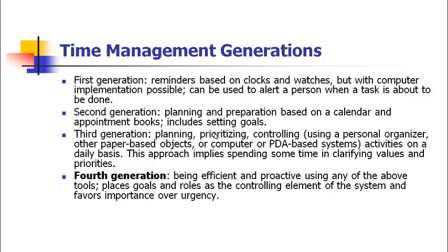Then they try to figure out how much effort is needed for that, because that is the longest duration, and your project start and end time gets decided based on that. Also, if any activity gets delayed, that can impact the whole schedule of the project. So the CPM is very critical in the whole time management and project planning side.